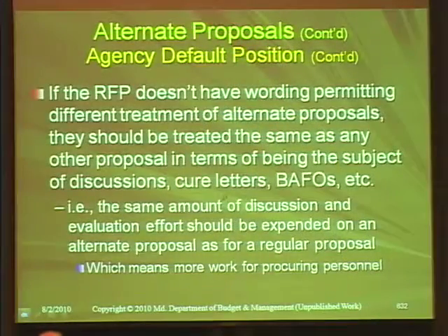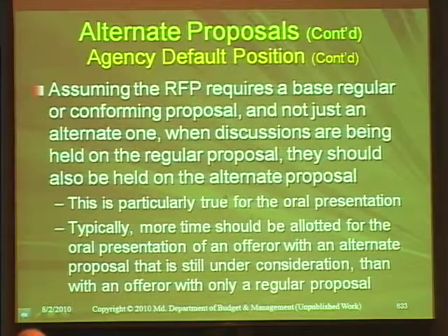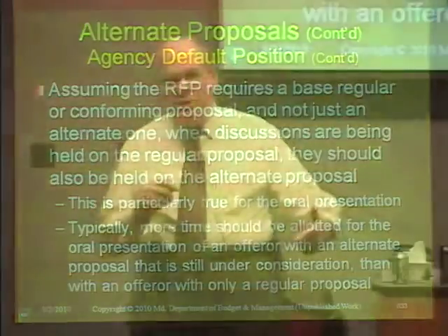With the same amount of discussion and evaluation effort expended on the alternate as for the regular proposal. All right, assuming an RFP requires a base, regular, or conforming proposal and not just an alternate one, when discussions are being held on the regular proposal, they should also be held on the alternate proposal. So if you didn't have the wording that takes it out of the realm where you can do discussions, then